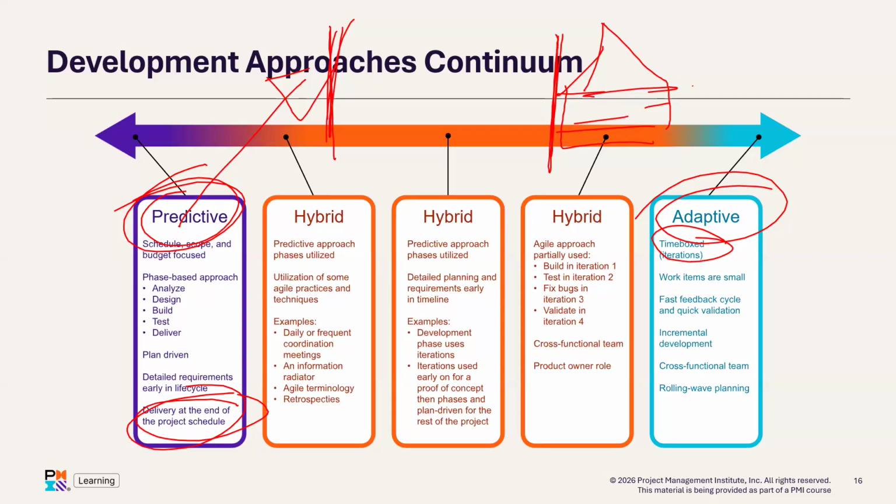We take the backlogs, which are small aspects of the total product backlog. You pick them one after the other, and then we execute them in small chunks. Once we finish, we will get results. We will make the results available to the customer for feedback, and the feedback will be used to either refine and improve or to drop the backlog.